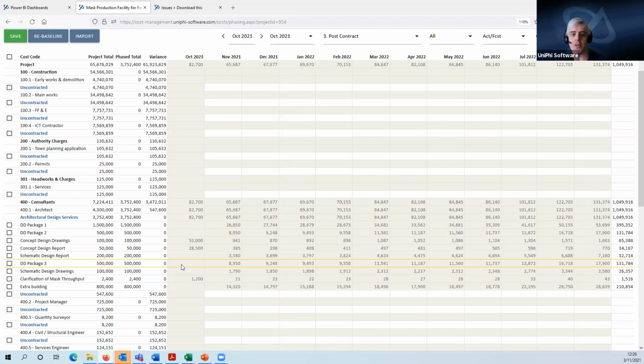If your cost code structure is the level of detail you need to look at things at and you're reporting against, then there's no value going down to the granular level of contract phasing. If you're mostly working in contracts, then that's what is going to be useful to you. And typically, if you're managing your revenue, that's what you're doing. And look, there are exceptions on each side of it. But it is a much, much, much more detailed view to be looking at.